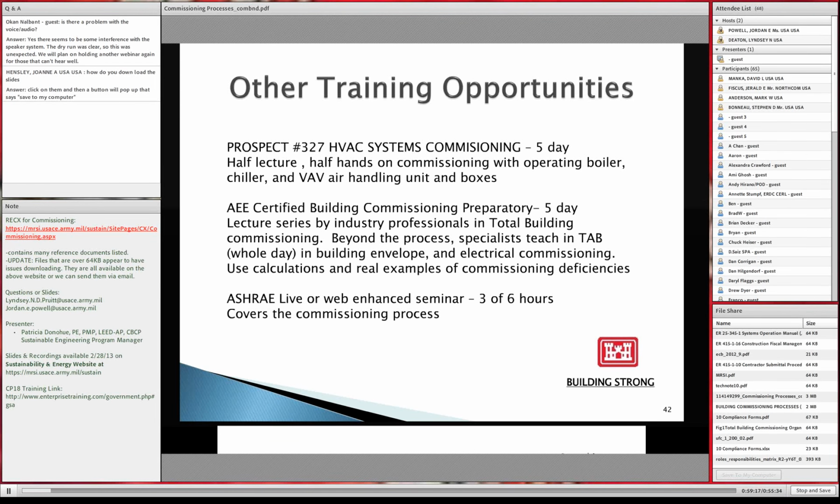The last question is from Norm Schaefer. Will commissioning become another line item on the DD 1391? There's a lot of discussion on that, and basically, if you go back to Ms. Hammock's one statement in 3 pages, and I took a look at that because I kept thinking it was USACE's problem, but she did send this to IMCOM. She sent it to all the agencies, and it says you need to plan and program for total building commissioning. So we should be including it, and that's why I wanted to include costs.